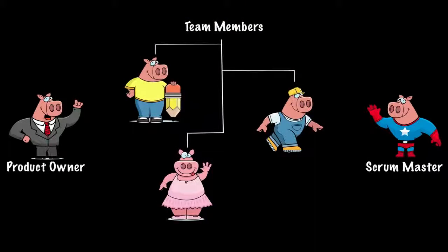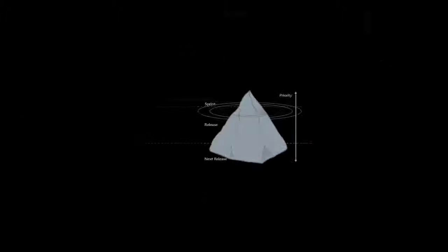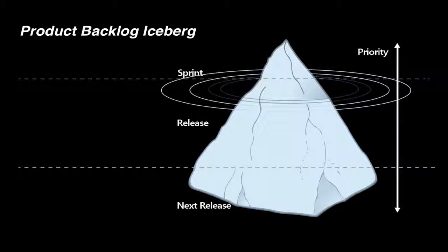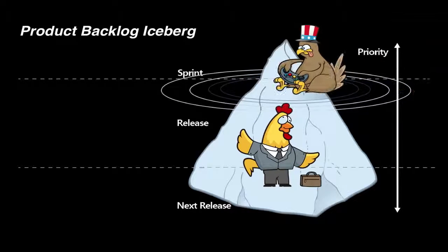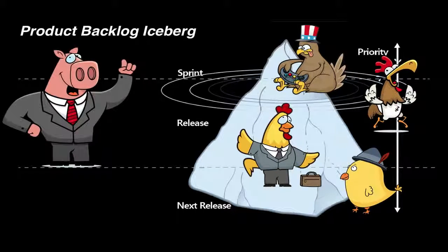Scrum projects begin with a product backlog. You can think of a product backlog as a wish list of input from all parties involved in the project: developers, executive, customers, support staff, and the like. This input is groomed and prioritized by the product owner, typically in a user story format.